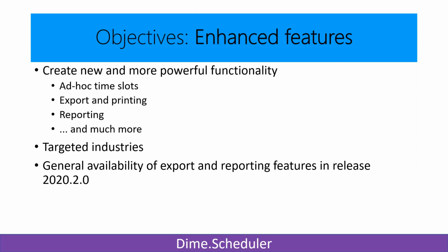These ad hoc time slots would fit in nicely with the calendars. Whereas calendars are static and applicable for a group of resources, impromptu time slots are generated on the fly and can apply to any resource for any reason. The classic example or use case would be illness of a resource. It's something you don't plan ahead, but it certainly affects the planning of that particular resource. Calendars are just unable to handle this kind of exceptions, but these time slots would do just fine.